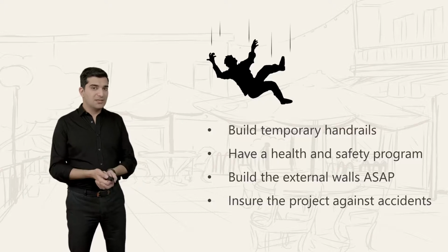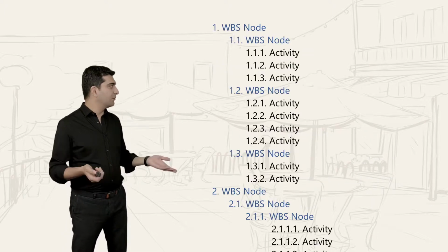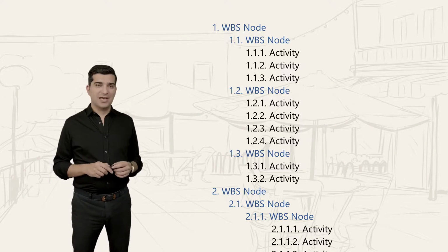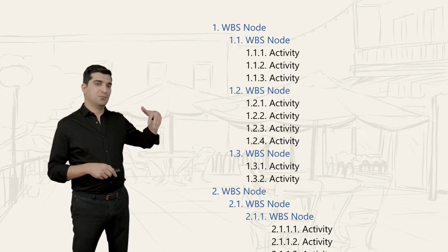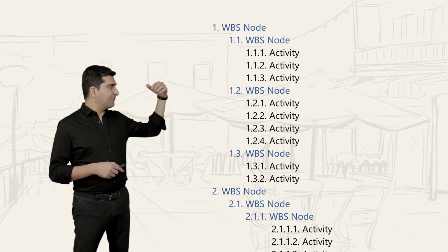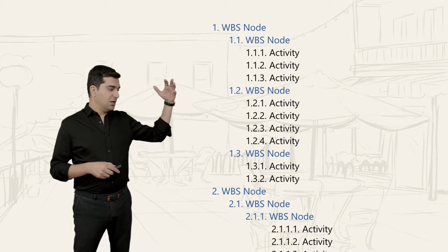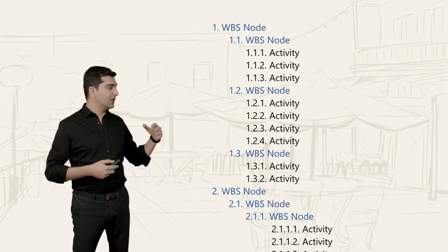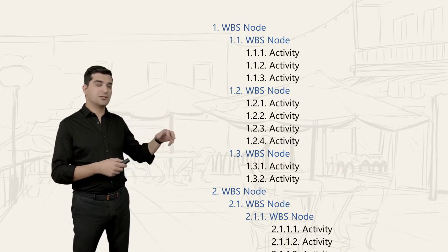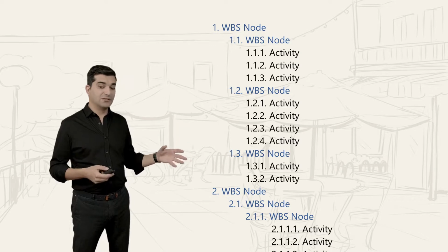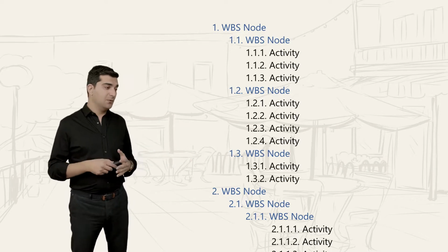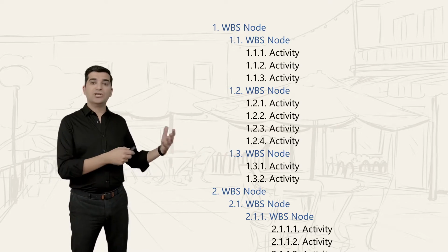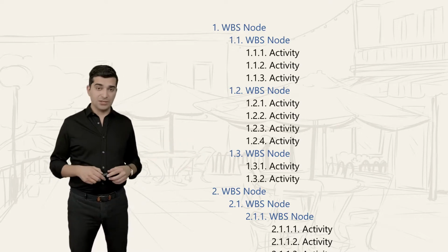And what do we do with them? They are like activities. We will put them in our list. And then when we do that, we have to go back, we have to estimate their durations, redesign the dependencies, get a new schedule, and also estimate their cost and consider it in everything else. Maybe we want to change our procurement, for example, to reduce some of the risks.